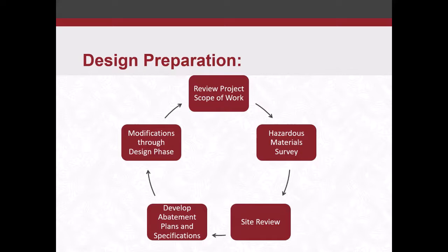Otherwise, unless you're surveying the whole building, you might have some things that get missed on the survey. You could just imagine if you add things after the survey, that survey isn't covering it. So the more defined your scope of work is before you do the survey, the better results you're going to have with your survey and with your design subsequently. So timing of that survey is critical. Obviously you'll have design deadlines and project deadlines, and you want to meet those, but you don't want to get that survey done too quickly because you may end up having to go back and redo some things. So just some things to consider on that front.